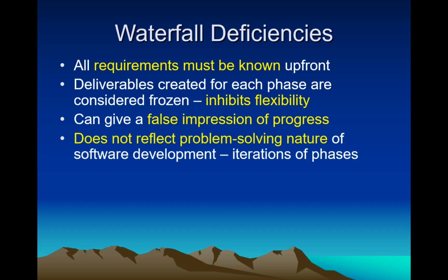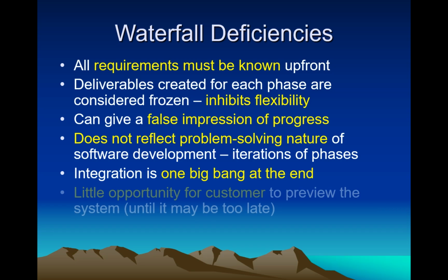Fourth, does not reflect the problem-solving nature of software development, iterations of phases. Fifth, integration is one big bang at the end. 6. Little opportunity for customer to preview the system until it may be too late.